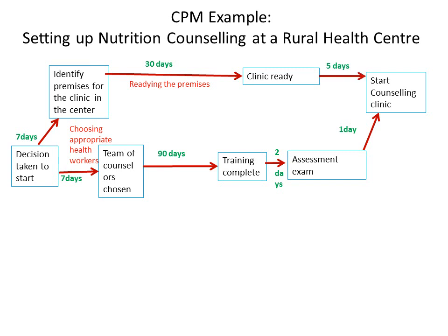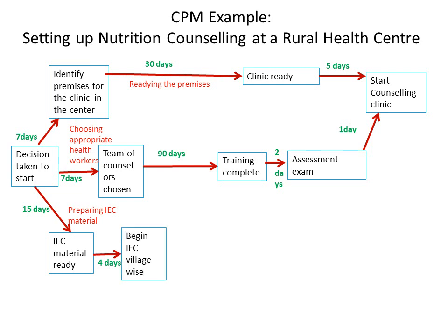With the decision to start counseling itself, a team can start preparing the IEC material. IEC material is required to make people of the area aware of the counseling center so that they can bring their children for nutrition counseling. The IEC material would be ready within 15 days approximately, and within 4 days they can start the IEC, the information, education, communication for the villagers.